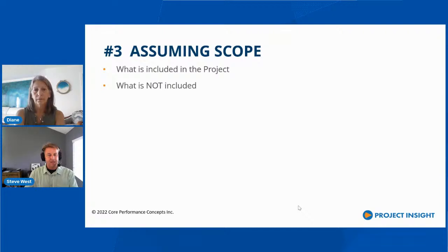But how do you handle it when things do come up that you should do? So the first question is, does the thing that comes up help me achieve the goals that have been spelled out? Is it necessary for that? If it is, okay, I might want to consider it. But if it's not, then guess what? That can go to phase 2, the next project. So that's a good simple process. That's a simple way to manage that expectation.